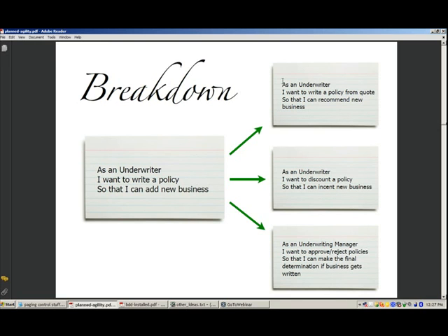And then you can see that we have the ability to break that down. Now, when you're breaking things down, I highly recommend, I think this is a deal breaker: if you're not breaking it down with the person that wrote the story, something's going wrong. There's a lot of opportunity to go unilateral in here. There's a lot of opportunity to make false assumptions. But the activity of breaking things down is incredibly valuable, and it helps us get to small stories that are deliverable and low risk.